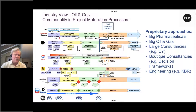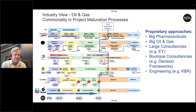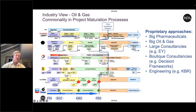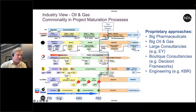Why do we think framing is going to work in government? Here is a slide showing the similarity between most project maturation processes in use between a lot of the oil majors. Fundamentally, what we require in a Green Book compliant business case at SOC, OBC, and FBC lines up to what is really going on in oil and gas. Knowing that framing works very well in and across oil and gas, I am very confident that it can be mapped across and be useful in our space, and that has proved correct.